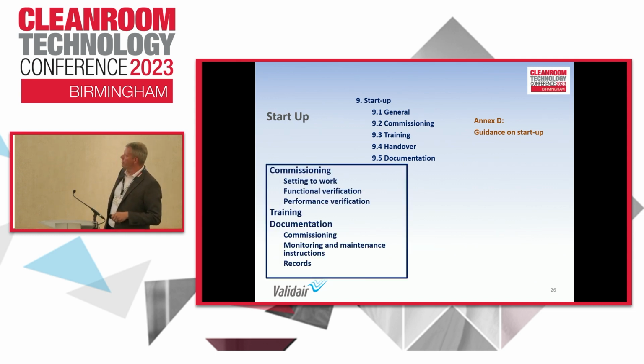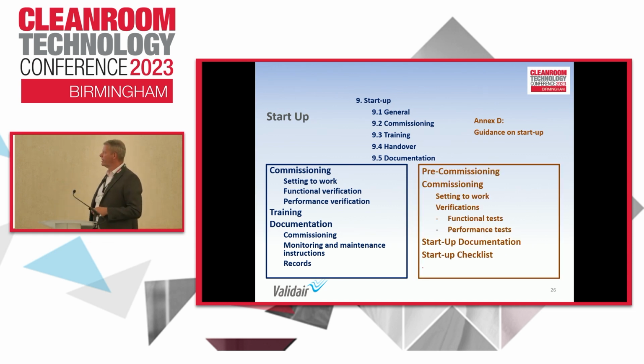deals with. So the commissioning period has a setting to work, has functional verification and performance verification. They're what we kind of call OQ in our pharma world, but they're separated just slightly by what that means within that section. Then there's a bit about training that needs to be provided and what documentation is handed over at the end. And the annex gives you a bit more information on all of those elements.